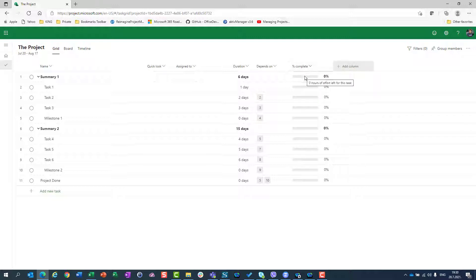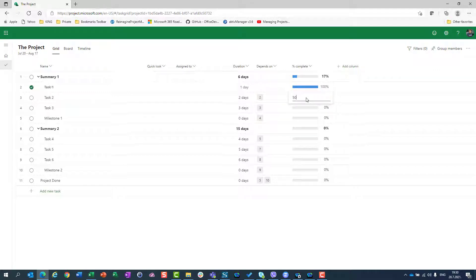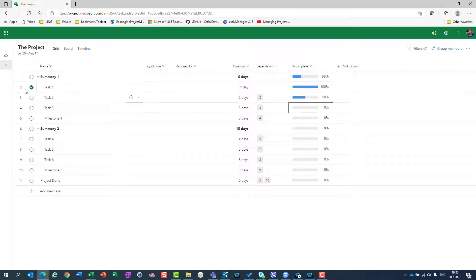Percentage of Complete shows how much a task is completed. If I click on this task and put 100%, you will see that the bar will be fully filled. If I mark task 2 as 50% completed and enter 50, you will see the bar is half filled. Notice that when a task is 100% complete, it has a check mark and a line through the name showing it is completed.